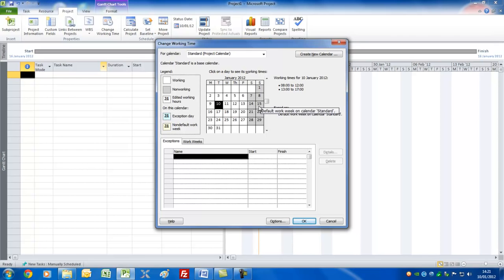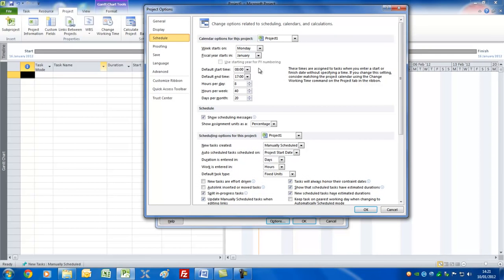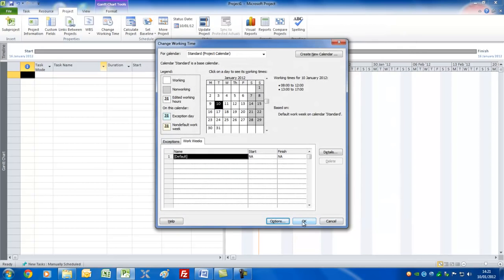If you wish to change anything for the standard project, under Exceptions you can put in particular dates that you wish to make an exception — for example, when your company might be closing down — or go to Work Weeks where you can change the hours that you might work per day. If you do change the hours, go back to Options again and there's a convenient button where you can actually change this. You need to make this harmonise with whichever you've got, because it changes the way in which Project calculates. For now, I'm going to suggest everything stays exactly the same.